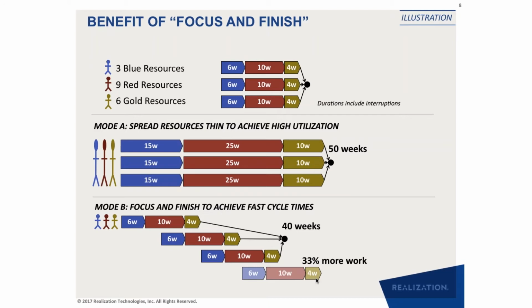That buffer of money is contingency and management reserves. Is it true? It is. But I think there is a slight difference in the way you use it. It also has an impact on how you calculate project cost and hold people accountable for project cost, especially when you go from a single to a multi-project environment. People know that you need contingency, and this is what they use contingency for. But the way it is used, the way it is financially accounted for, the way it is set aside, is where what I have put down in chapter 4 might be relevant.